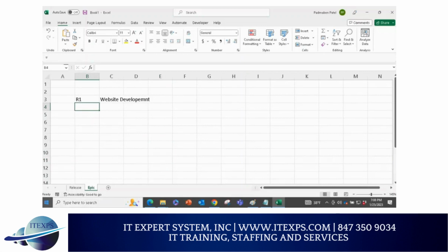Now the question is, what are the big ticket items I'm going to do, which are called epics. Epic means big, and it has a capability. Capability means functionality. In this release, I'm going to create epic 1, where I'll do product search. So a customer can do product search. Why? Because if I have products, they should be able to search them. You guys agree? In product search, they can search by name, by title, by price, by brand, by year, like that. Makes sense?